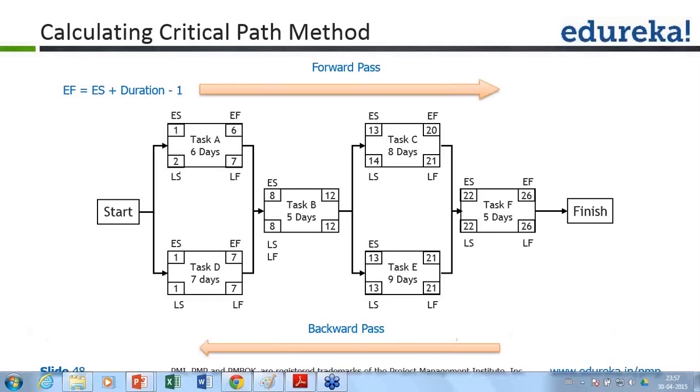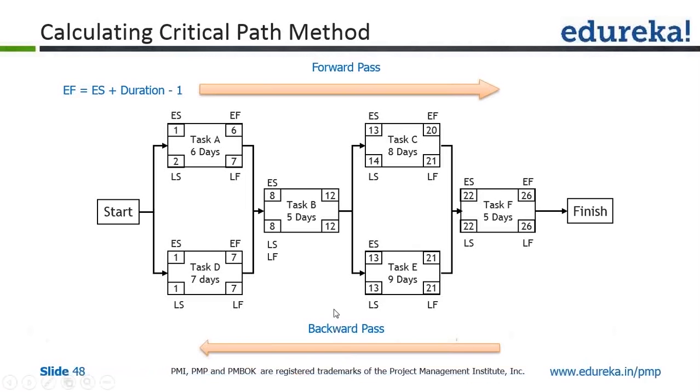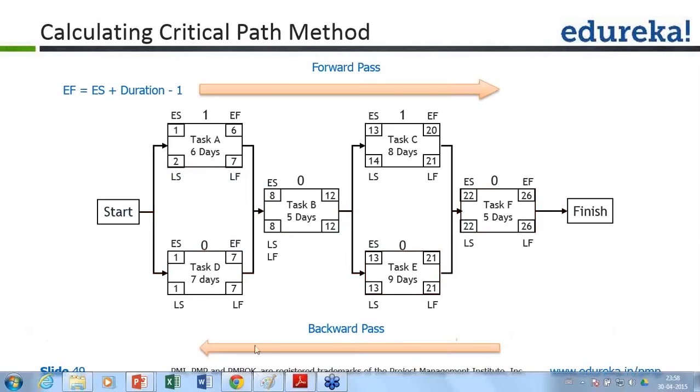Day 2. How I calculated this, you can use this formula as well here, which probably you're not able to see. I'm sorry, it is missed in this one, but you need to include this day 7 in this. So 7, 6, 5, 4, 3, 2. It must start on day 2. So that is the latest start date. It means if it goes beyond day 2, then you will not be able to complete it on 7. It will get pushed beyond this. Is it clear?